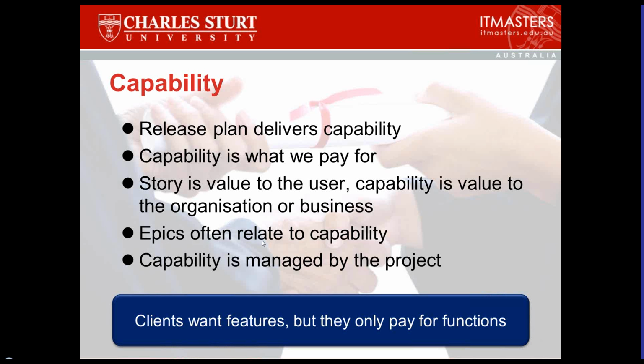You're just building whatever it is you feel like because you feel like it. And so unless you have that feedback loop, which is the adapt, unless you take that knowledge and apply it and make use of it, then you're not agile. You might be staged. You work in cycles, but the cycles don't get any feedback, so they're not really an iteration. An iteration means that you improve upon it. It is something where you take another look and try again. So yes, you need to have all three, and all three properly done to really consider it a proper agile iteration.